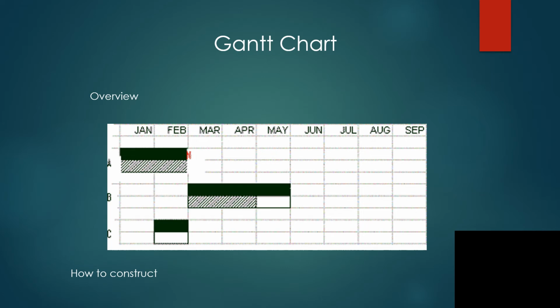Gantt charts are traditional management aids used to schedule projects. They may be simple schedules that you develop on graph paper or complex and sophisticated versions that you create with computer software. You construct a Gantt chart by separating a horizontal axis into equal increments, hours, days, weeks, or months, and by using a vertical axis to list project tasks.